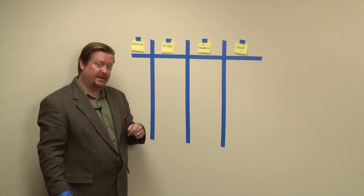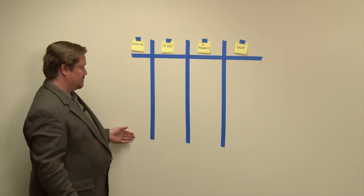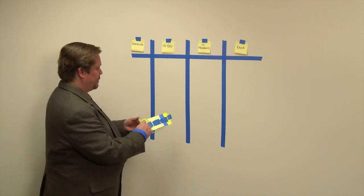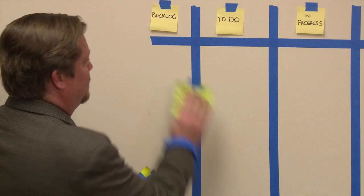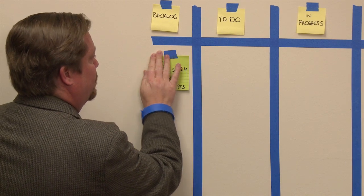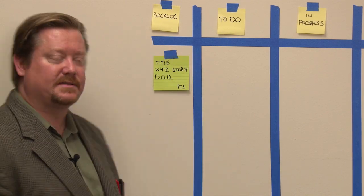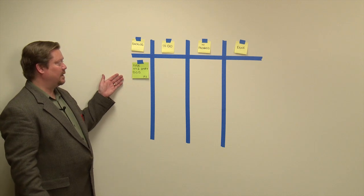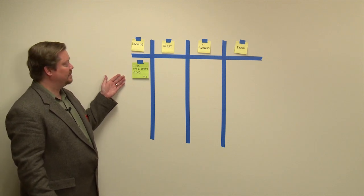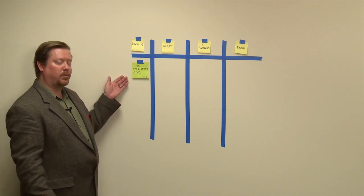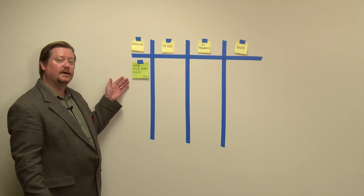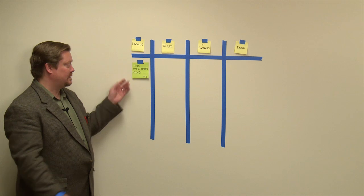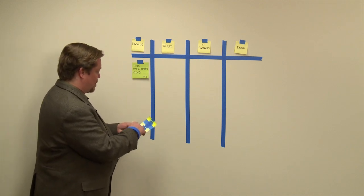Now you want to populate your backlog. You use story tickets. I like to put a certain amount of information on my story tickets: the title, an XYZ user story format, definition of done, and points. You might also put acceptance criteria on them, and you can even use the back of the ticket if you need extra room for information. So let's populate our backlog.